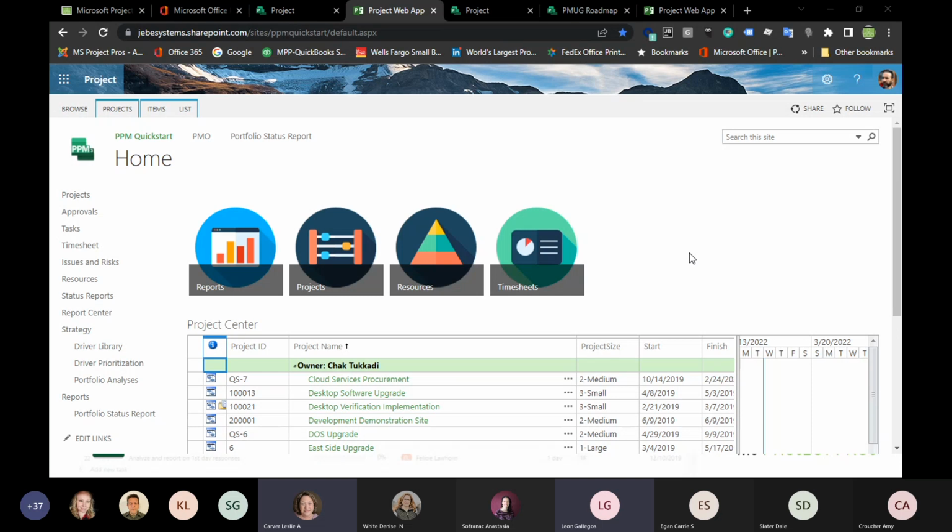So you can think of this as a role-based tool as well, so that users basically get slotted into a particular role. So a team member is different than a project manager. If I'm a team member, I'm going to get assignments, I'm expected to work on tasks within a project, and then report up for approval by the project manager. So that team member, when they come in, would see a completely trimmed down version of this. So there's security trimming that's involved. As a team member, I have the least amount of rights.